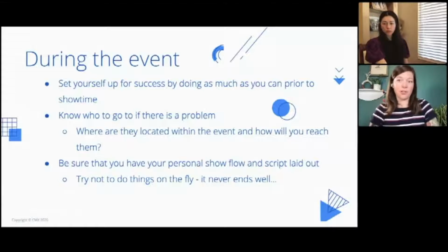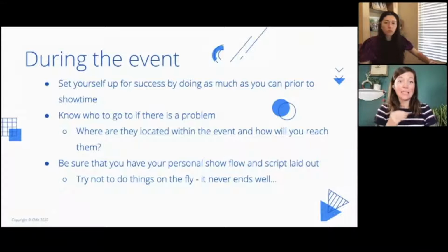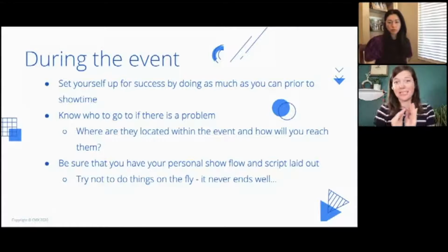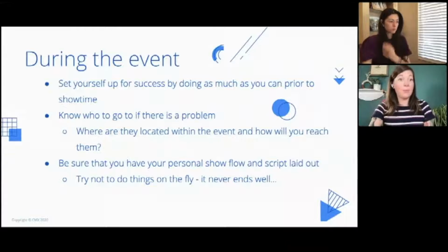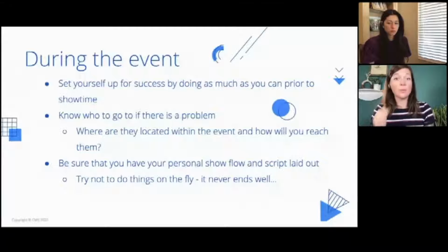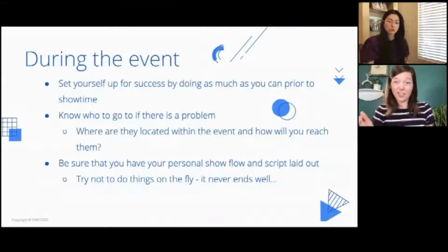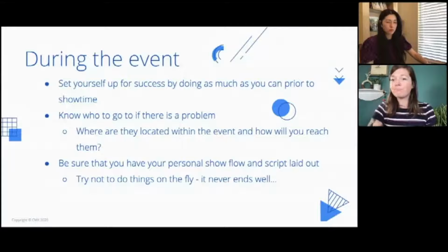So we scheduled dress rehearsals. We wrote speaker guides, volunteer guides, and sponsor guides with step-by-step instructions for everything people needed to know about the platform: how to get into the back, how to figure out streaming videos, sharing screens, everything. Sometimes we felt like the table of contents because people would ask us questions and we would just point them in the direction of all the answers. But it was well worth it because when showtime came, we really didn't have that many technical difficulties or hiccups from the speaker, sponsor, volunteer side of things.